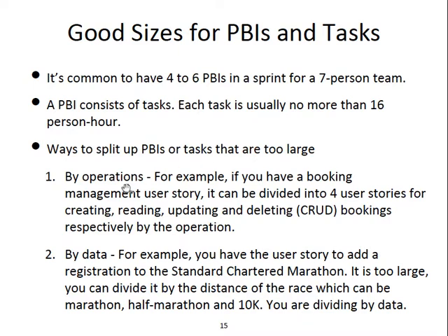And why do we want to divide it up sometimes? Because if the task becomes too big, it's very, very difficult to track. So ideally, we want to keep a task to be about 2 or 3 person days.